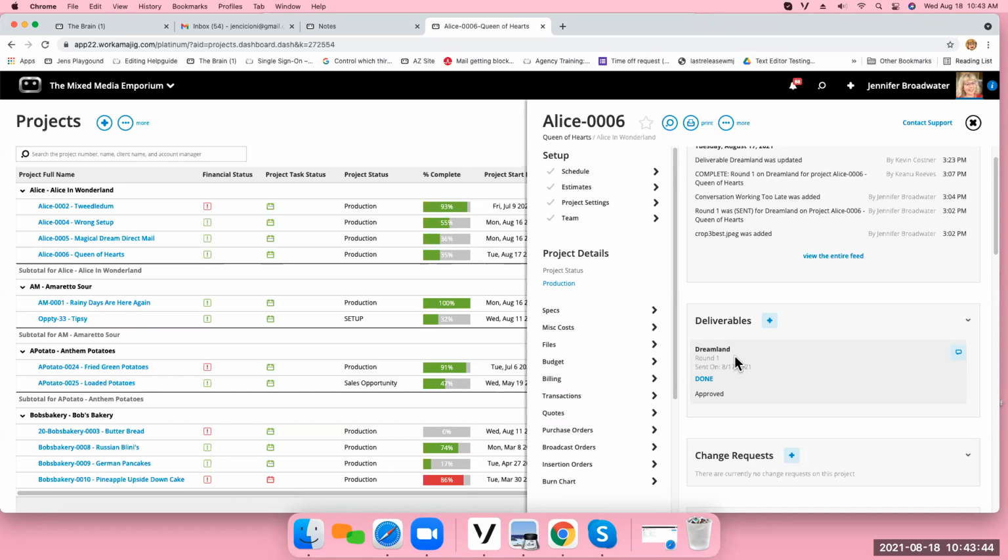And then if you have a lot of deliverables that you're doing for one client, they've asked you to do a website and a flyer and this and that, they will collect them into a campaign and then create one deliverable for each. I want to keep it orderly, because sometimes it's hard to control a bunch of deliverables all in one schedule versus having a simple schedule with one deliverable each.